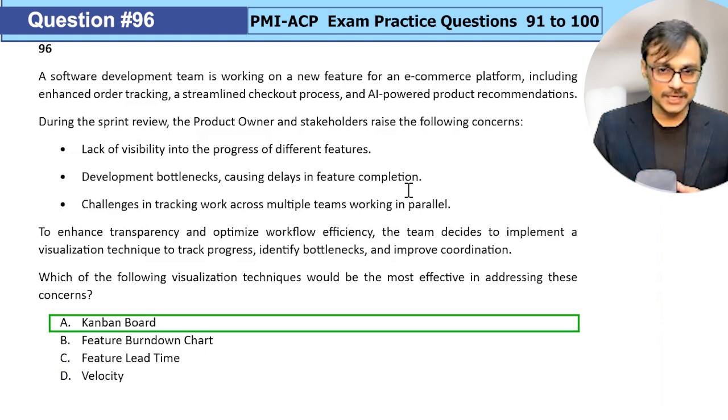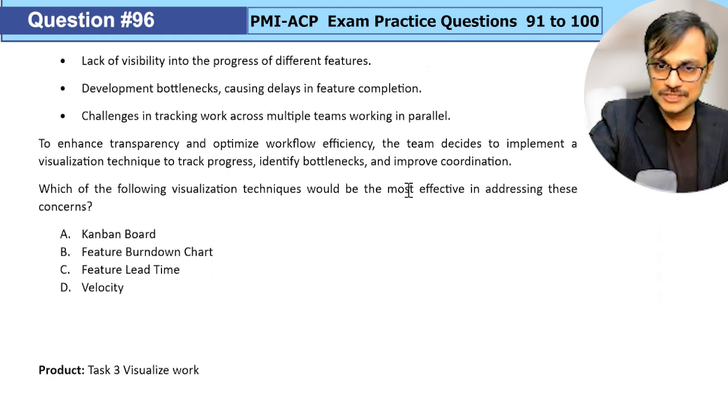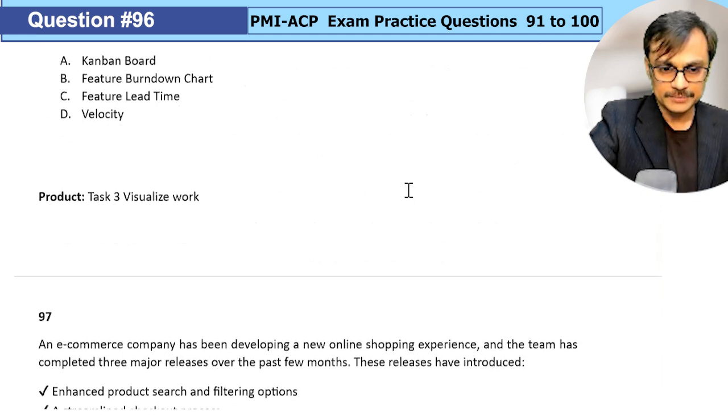So in this particular case, I can go with option A, which is Kanban board. Now, this question is also focusing on task 2, visualization of the work of your product domain.